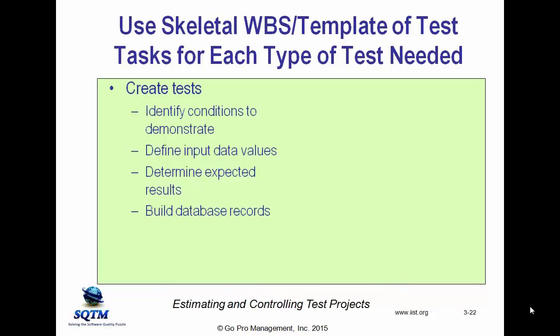And to do that, and some of these are things that you mentioned, you've got to identify the conditions that you've got to demonstrate. You've got to define input values. You've got to determine expected results. You may have to build data records and so forth. Okay? You actually have to run the tests. Oh, and then you're going to have to rerun the tests for a certain number of cycles.